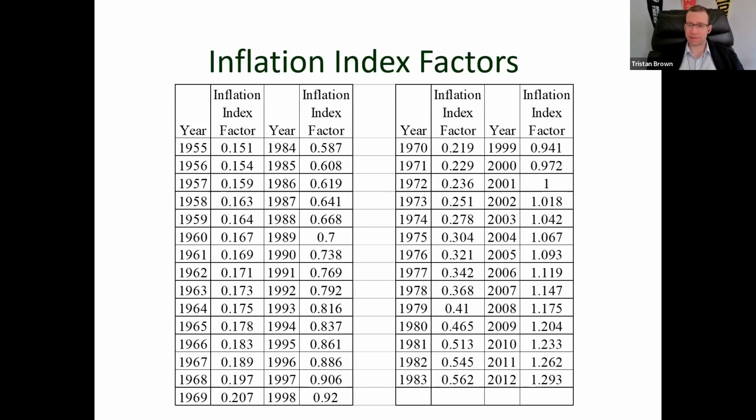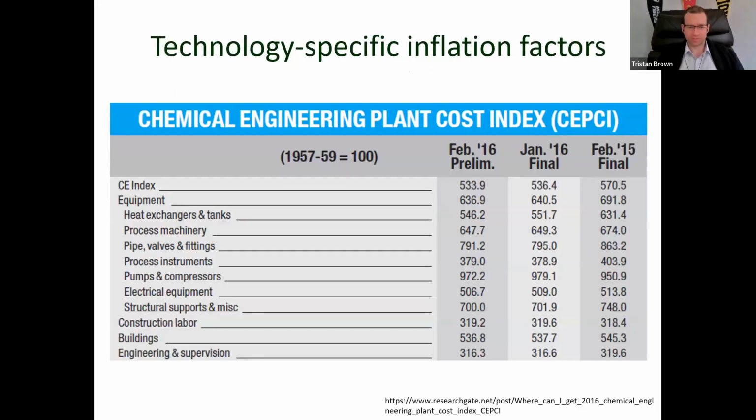And so I'll take the classic example now of solar PV. In theory, under inflation, you would think that the cost of a solar panel is going to constantly get more expensive, right? Because the purchasing power of your dollar gets less powerful every single year. But technological change has driven down the cost of producing a solar PV panel. And as a result, the cost of solar PV has fallen by about 90% just over the last 10 plus years. So technological change is going to be different than what we're talking about here.